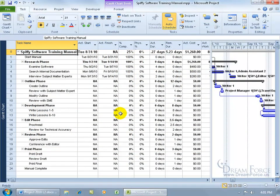I'm in the Gantt chart view here, but I've changed the table from the entry table to the tracking table. Now in the tracking table I can go ahead and mark my task complete, as they're completed of course 100%.